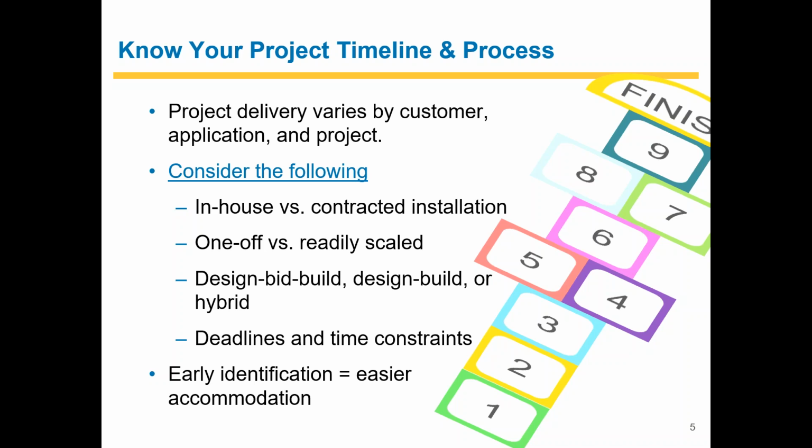Generally speaking, when people evaluate in-house labor, they're evaluating take-home pay, which is generally analogous to what people are seeing on a paycheck, versus what the owner is paying in terms of not only take-home pay, but things like insurance, sick leave, vacation time. All of those values get rolled up into what would be called a fully vested labor rate, which includes all those added costs. And so when you start including those added costs, your contracted rates for using an out-of-house third-party contractor actually start reaching parity with those in-house labor rates.